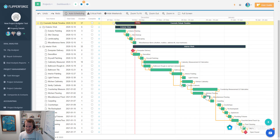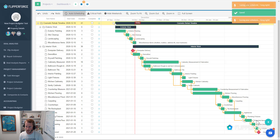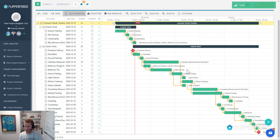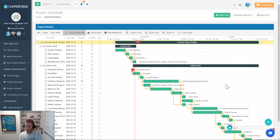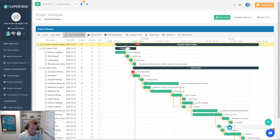If something on the schedule ends up taking longer than expected — maybe the kitchen flooring or the appliances took a while to get delivered — you can see how when I change that duration, everything downstream automatically shifts. That's because we have auto scheduling on. The overall duration is affected as well. The overall start and completion dates of the cosmetic rehab timeline are based upon the items below it.